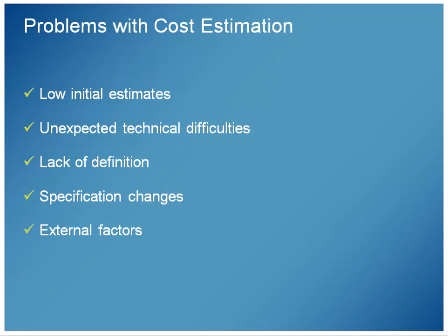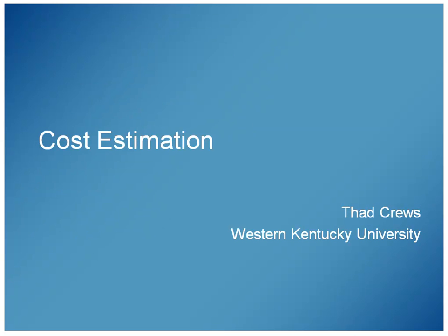And then the external factors. These would be things like inflation and economic issues and weather and natural disasters and any kind of disruption in the supply chain because another organization goes out of business or is having their problems, political interventions, any of these things. These are unpredictable. They're outside your organization's control. That's why they're external to your organization. Factors you can't control, you can't manage. And there's a reason that cost is an estimation rather than exact cost, because external factors in all these issues end up giving you an estimation of the cost rather than a guarantee of what the cost is going to be.